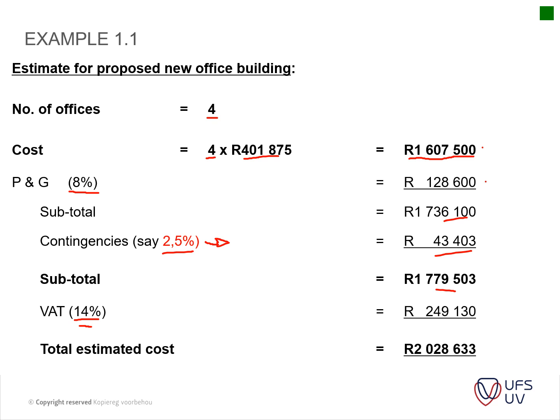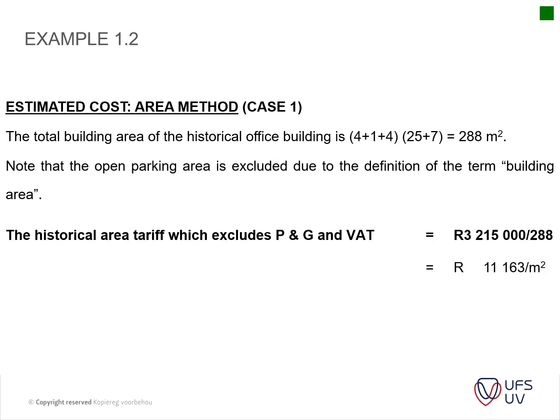That is when the project is done and dusted, and all the expenses have been paid and agreed with all the parties. Okay, so very basically, you've got your subtotal, you add your VAT to that, and you have your total estimated amount. Okay, so that's our unit estimation.